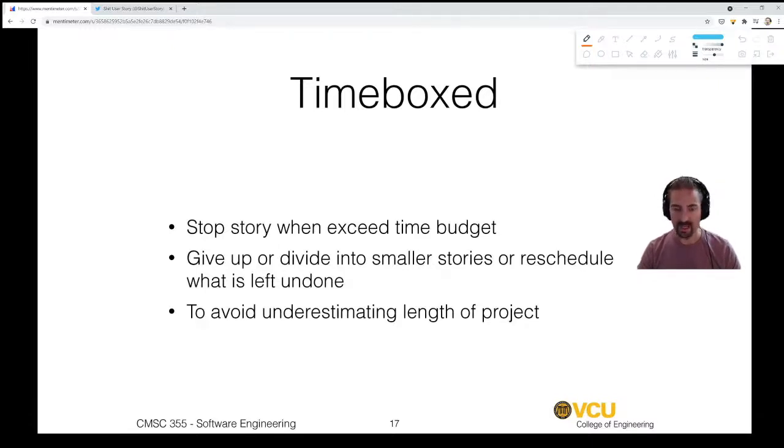All right. Another thing is you have to always time box a user story so that it doesn't get out of hand. Let's say you've noticed that Joe has been working on the same user story for 3 or 4 weeks on end now, and he's not made progress. That is going to be a problem eventually, because he should have been working on other things and getting them done. If he's getting stuck indefinitely, that's a problem. So you definitely want to time box your efforts on these user stories.